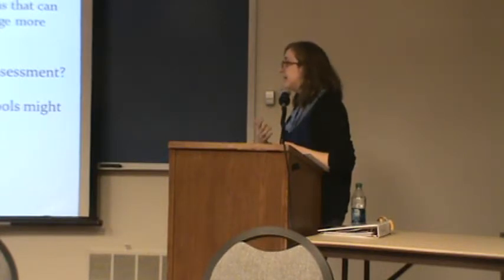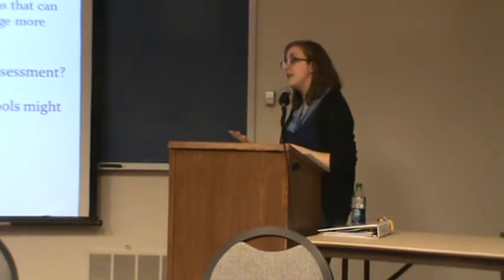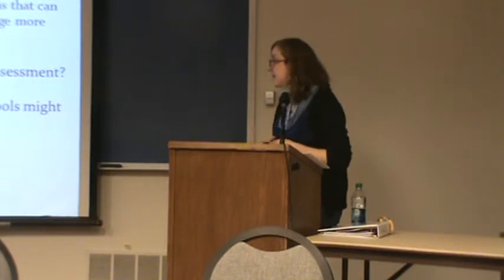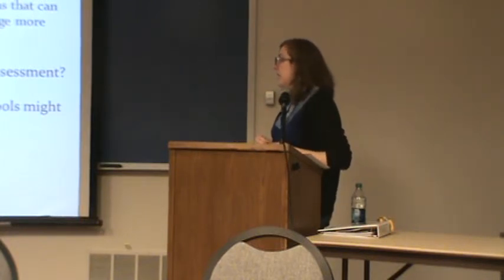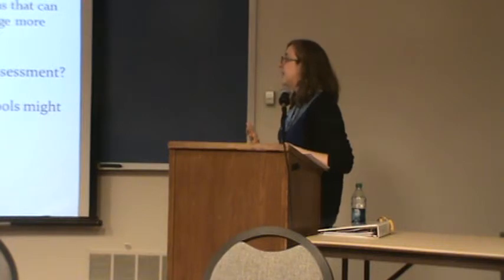This could also just be a pilot project where it's just a couple months, you see if it works, because this is very expensive, and if you find out everything gets damaged, well, you have to think about that. So your outcomes could just be in the next 2 months, we'll monitor the results, we'll see if circulation stats on these go up as the word gets out, or if they go down and no one's, even though the community said yes, they wanted it, turns out, oh no, it was too much effort still to come into the library.